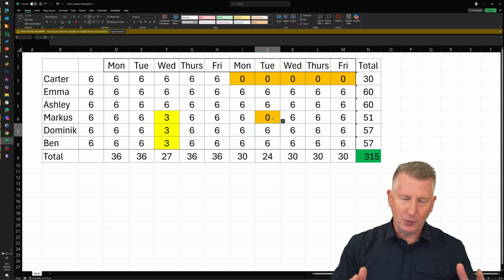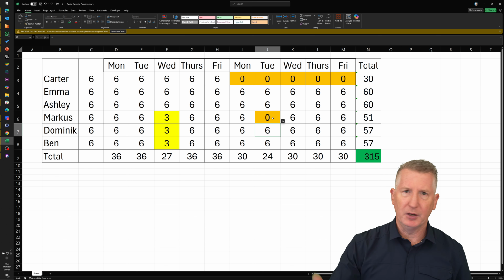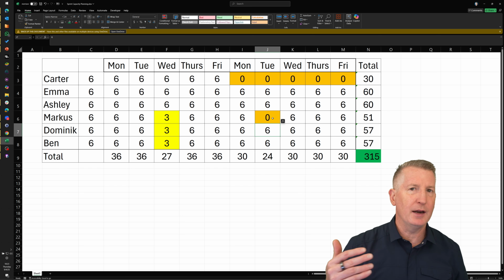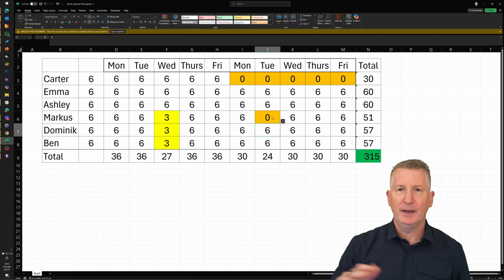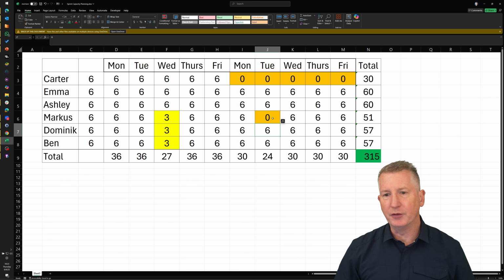So to recap, here's what you can do to help your team at the beginning of every single sprint. Simply sit down, ask them, hey, look at your calendar. How many hours will you contribute each day? Hey, I'll do 6. Cool. Do you have any blockers? Are you going to be out? Any planned outages? Yeah, I'm going to a dentist appointment. I've got a meeting I have to attend for our group, and I have to take my kid back to college, right? So I'm not going to be here. Awesome. Gives us our total.